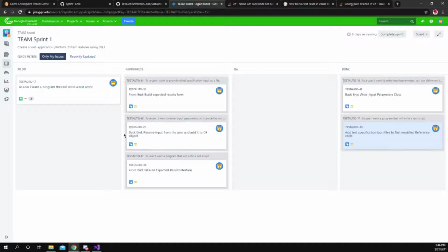It's not the smartest way to do it. It's better to just set little steps, you know. And I ended up not completing it. The reason being, we really needed the front end to be set up first. And I'm pretty sure that's an experience all three of us learned.